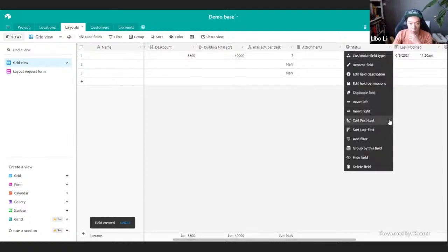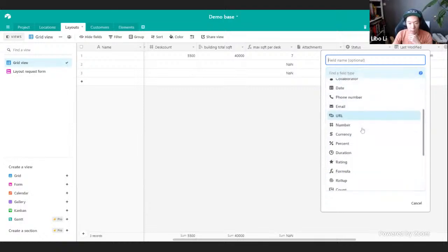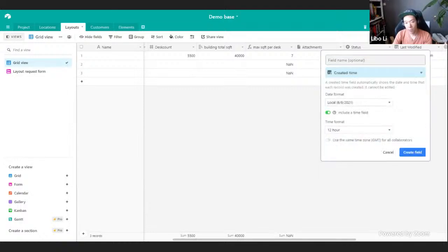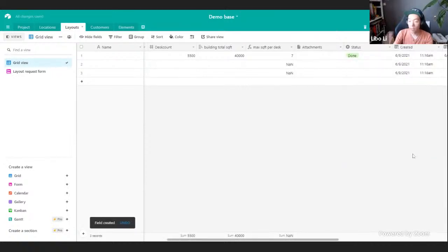You can do a created date. So if you're doing a form, right, and new data is coming in, you can measure the volume of requests, and then you can do sort of created to done. And that will give you how long each takes. So passively, you should start to measure: okay, some projects are really hard, some projects are really easy, but the majority of the projects fall between these two ends.